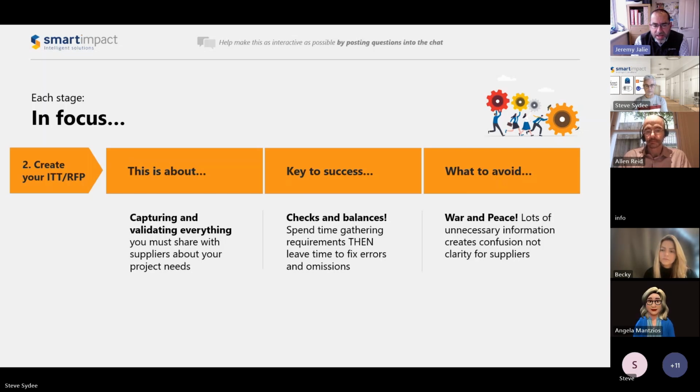And in my experience, the easiest way to really understand what an organization is looking for from an output perspective is to provide thematic requirements as well as functional ones. So describe what the business is looking to achieve by implementing the technology and what the overall outcomes of the implementation should be, rather than just doing them line by line.